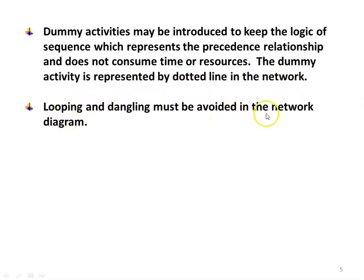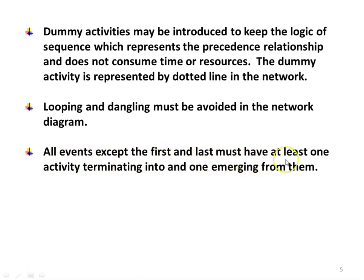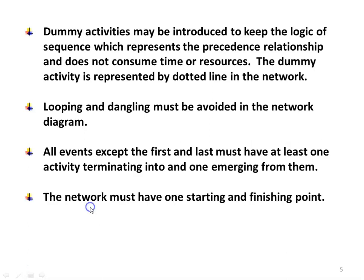Looping and dangling must be avoided in the network. Looping means starting and ending activities are connected by backward and forward arrows, which is not permitted. Dangling means an activity or event hanging freely — they should have a logical relationship between the previous and future activity. All events except the first and last must have at least one activity terminating into them and one emerging from them. The network must have one starting point and one finishing point.